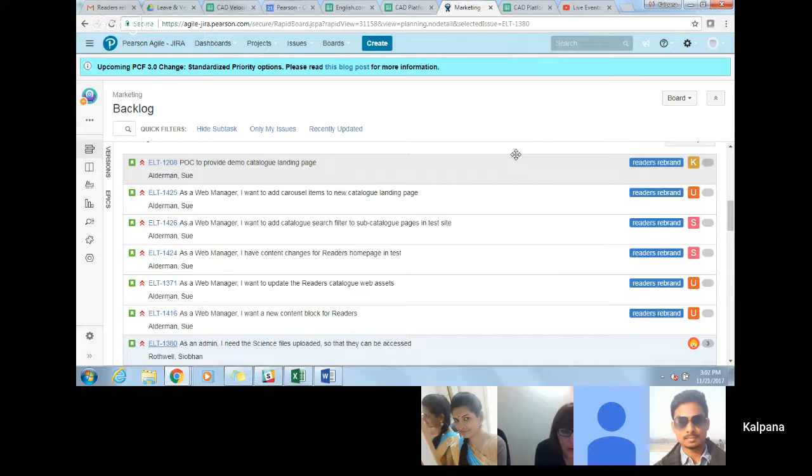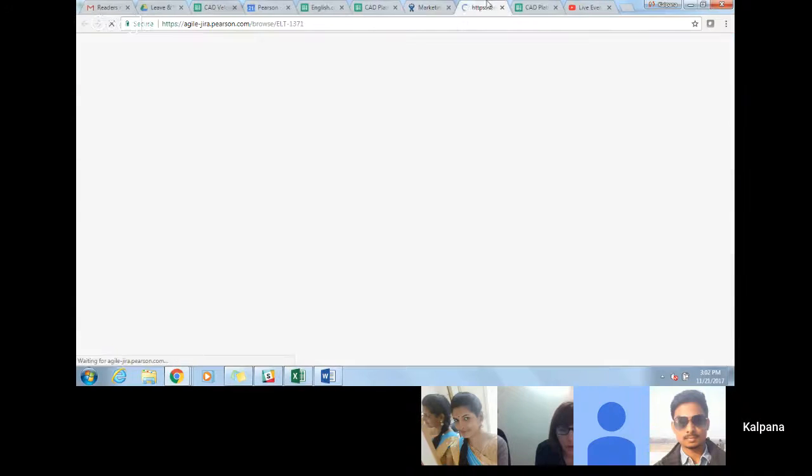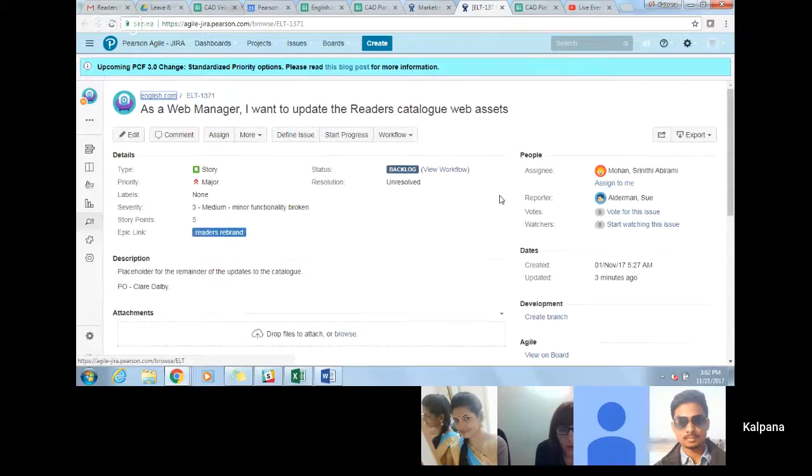Actually, I have a suggestion. In the readers catalog update page, we have around 88 titles. So can we split it into two parts? Because in this sprint, if we can take one part, we can accommodate one or two more user stories in the English ELT sections. Yeah, that's a good idea.